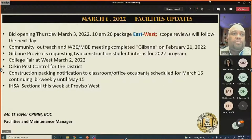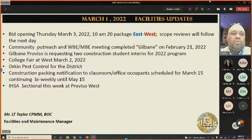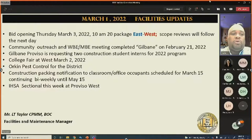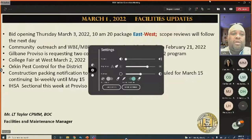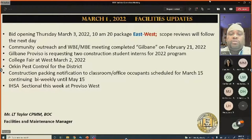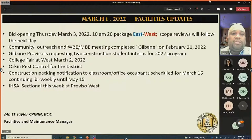LT thanked Gilbane, noting 20 bid packages will open Thursday with scope reviews the following day. He thanked Gilbane for the community outreach session to engage WBE and MBE participation firms, noting a few were on site. Proviso is requesting two construction student interns for the 2022 program, using a professional interview session similar to last year's process.